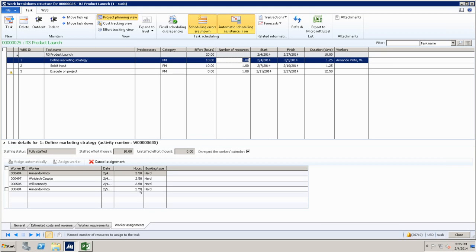If I'm not mistaken, you're talking about subcontracting scenarios. Today our subcontracting story is through a PO. You cut a purchase order, and you have a project category that is mapped to a service item in AX. You're familiar with products, services, items. So you have a service item mapped to a project category that reflects the cost and sales and all of the financial aspects of it.